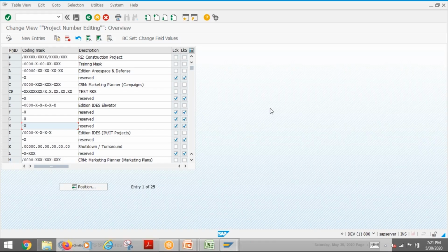So I think we should use the number, not one letter, but 2 letters. I think it's better because after using one project, I cannot change. I try to change here and they say, okay, you cannot change the number because you already have a project. Yes, you cannot change it. So at the beginning, I should use 2 and then AA, BA, B1, B2, B3. So a lot more options. No, there is also an option difference actually. For example, if you start with B, then B is allowed only once.